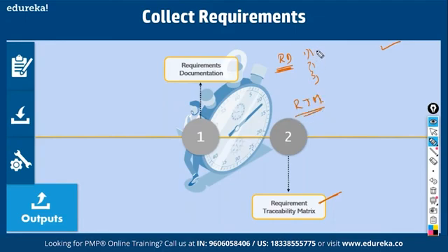So you have to map the requirements to the high level business need, that is, you want to be the market leader. Then you may have to map this to architecture drawings, then database procedures. Then for this particular prototype, you would have done a lot of tests: test cases, test scenarios, test conditions, test results. You have to map it through all these, and only then you can sign off. That is called the requirement traceability matrix. So when you collect requirements, you also stipulate the template in which you'll be demonstrating compliance with requirements to the stakeholders later on, so that you'll get a formal acceptance.